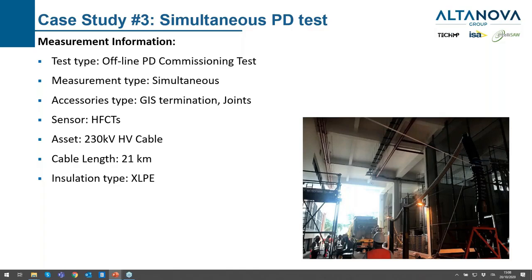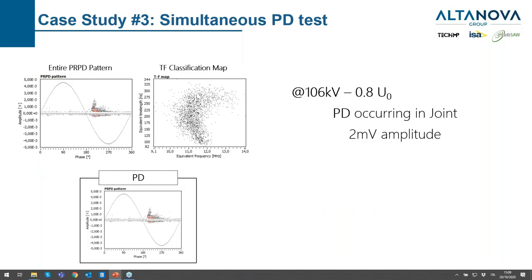Another long circuit simultaneous PD test was an offline commissioning test. GIS terminations on both sides and joints in the middle; we were using HFCTs. The cable length was 21 km. We had a permanent monitoring system installed and were taking advantage of the permanent monitoring hardware to perform offline spot testing. It was possible to see a very small PD activity in one joint — 2 mV at 106 kV, which triggered the attention of the testing team.